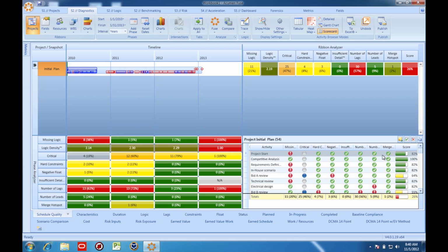The scorecard view indicates that some of the tasks pass all the criteria, while many others have at least one red exclamation point. Remember, only those tasks that pass all of the criteria will have a positive influence on the overall score when activity-based scoring is used. If I correct all of the problems within a single activity so that I eliminate all of these red exclamation points, my overall score is going to increase slightly.